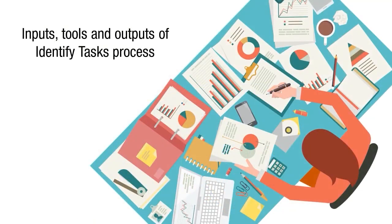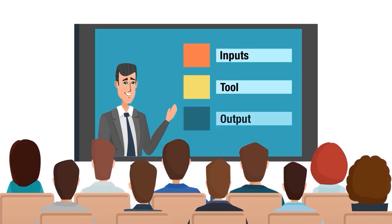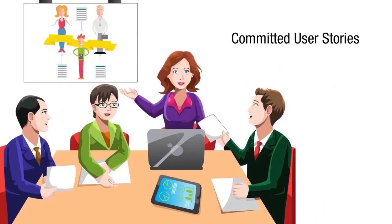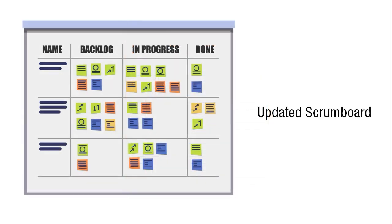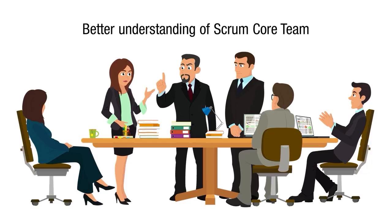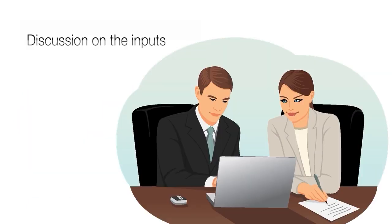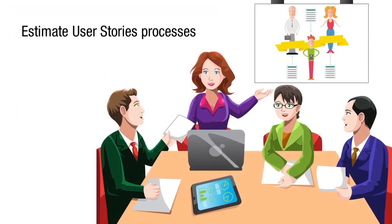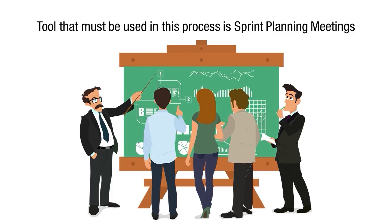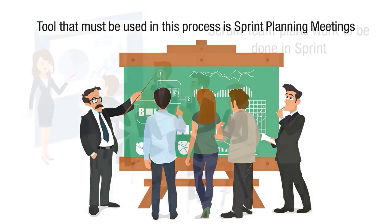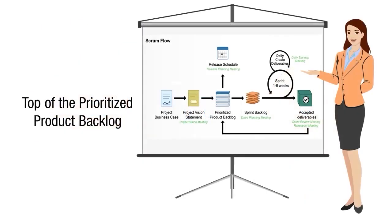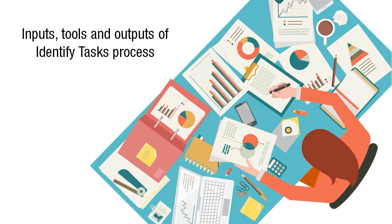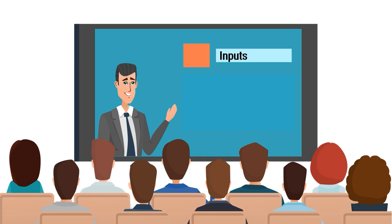Now let's discuss the mandatory inputs, tools, and outputs of the Identify Tasks process. The mandatory inputs are: Scrum Core Team, Committed User Stories, and User Story Acceptance Criteria. The mandatory tool is Sprint Planning Meetings, where the Scrum Team plans work by reviewing committed user stories. The product owner is present to clear ambiguities. This meeting is time-boxed to two hours per week of sprint duration, preventing discussions that belong in other meetings like release planning or sprint review.